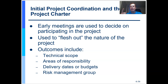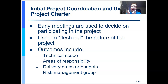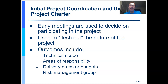You start with two things. You develop the project charter. What you're taking is the business case and the benefits management plan, and you're narrowing it down, refining it into a charter. Later, you'll refine it into a detailed plan. The charter is always high level, but it's still important because the objectives in a charter are measurable. You'll identify some key stakeholders, a high-level rough order of magnitude budget, some high-level risks the C-suite folks are concerned about, quality standards, and so on.